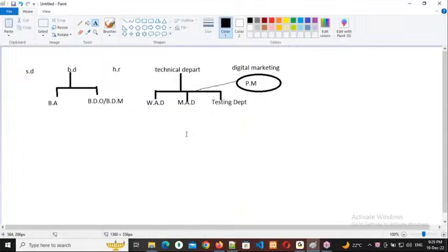They will finalize the price of the application, and they will finalize the deadline of the application, and the deadline of a single module. If everything is fine with that price, application cost, deadline and module deadline, then the lead will ask to start the work, and he will need to send some money, not the entire amount, just for confidence purpose. He will send only a little bit of money, and the application will start. This is the process to start the application.